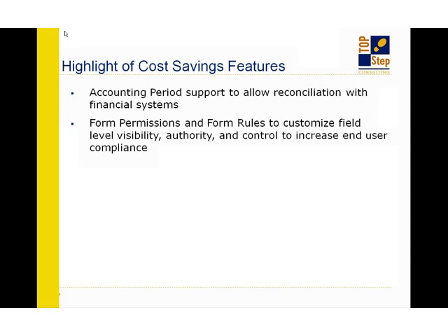Things like the research and development or the R&D team may be using OpenAir to put timesheet entries in, but they're not tracking invoices, they're not tracking budget, they're not tracking billing contacts and things like that. So you could hide all those fields from them, and their projects become more related to their R&D structure. Whereas in services, we do need to have who's the contact, what's the budget, and the invoicing activities.